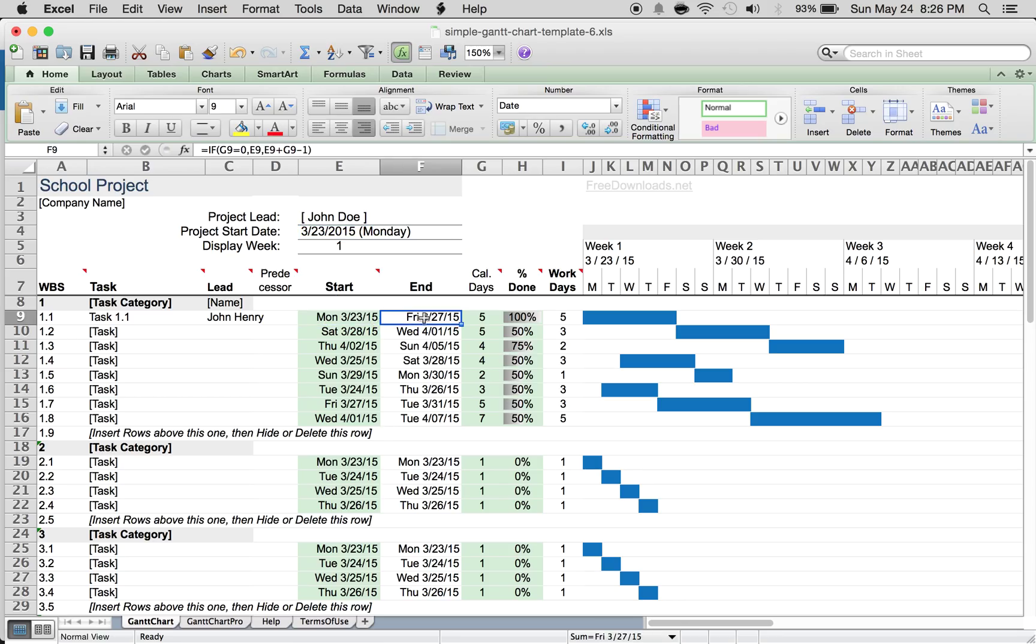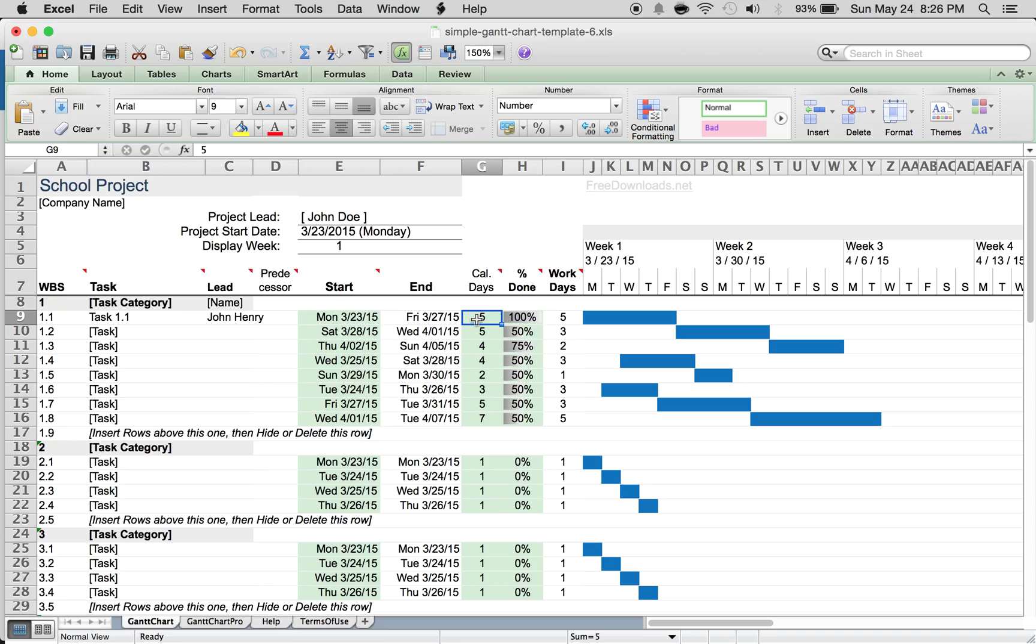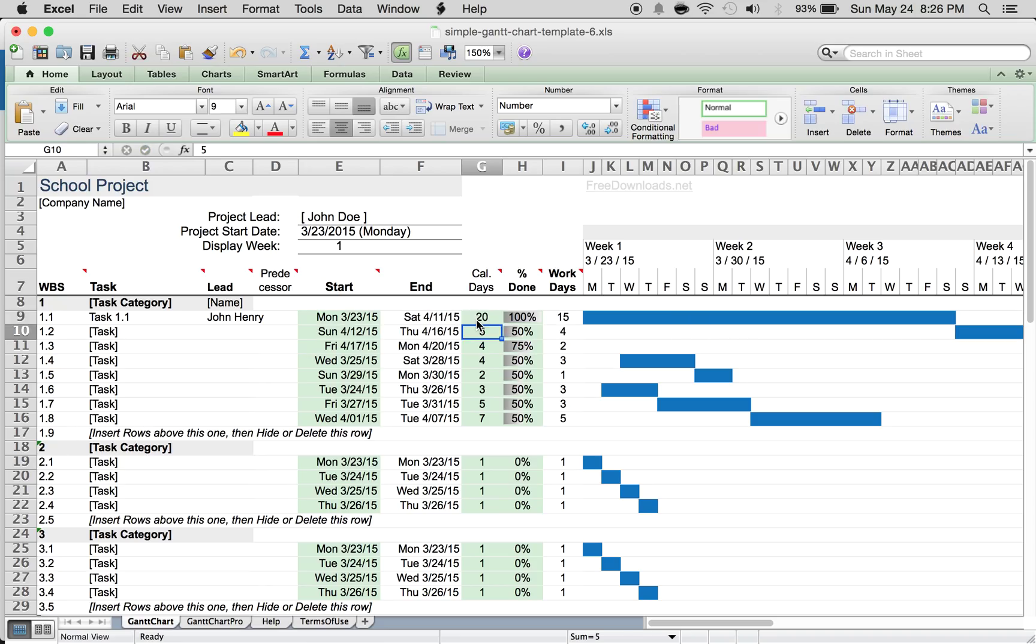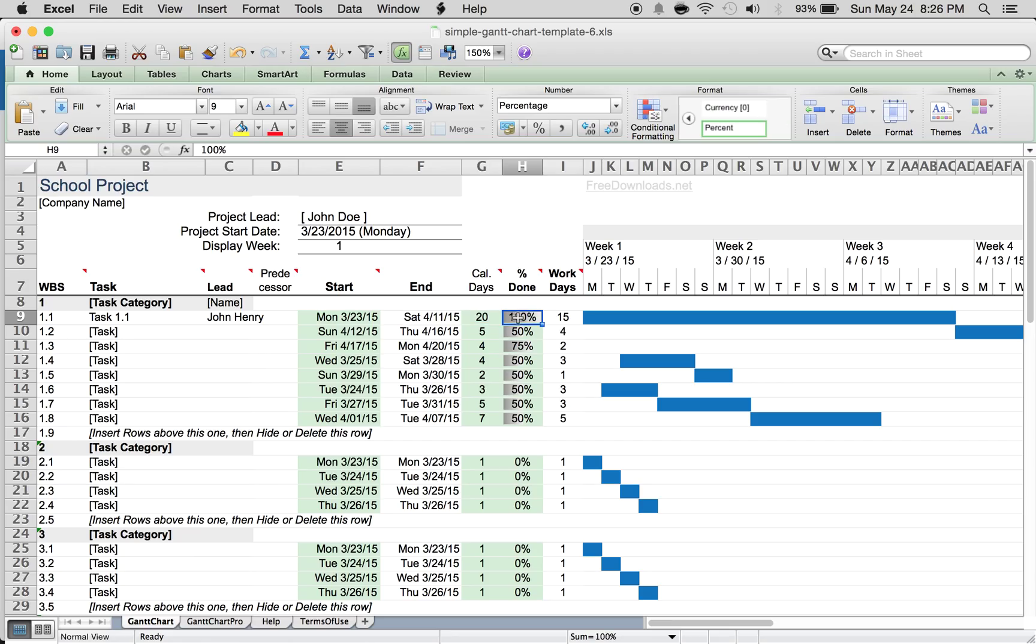For the end date, you don't want to touch this because of the formula. You just want to enter the calendar days. So say task 1.1 is going to take 20 calendar days. You can see that this goes all the way out here. For percent done, you can enter whatever you want, so it'll be 25% done.